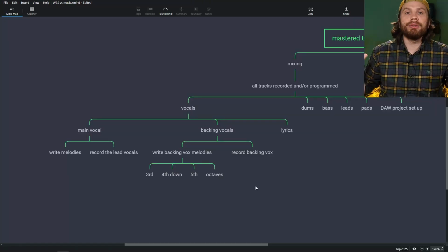Tip number 3, did you know that a work breakdown structure can actually help you manage your project resources? Just go ahead and add numbers to your tasks and deliverables signifying costs, durations, or any other resources you need, or all at once. This way you can later sum those up and predict your project budget, team size, and duration. And if you don't know the actual numbers, there's another tip coming up for you later on in the video.